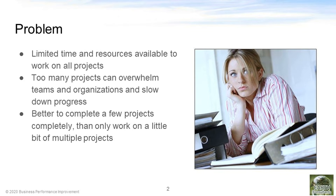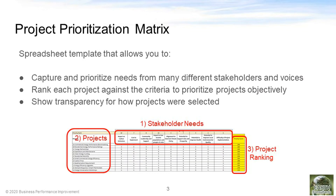So how do we figure out which projects are going to be the most beneficial? The project prioritization matrix is a spreadsheet that allows you to capture and prioritize the needs from all the different stakeholders and voices in the community. This is an approach I use in a corporation to take all the different project ideas and select the best ones to pursue first for Six Sigma and lean initiatives.